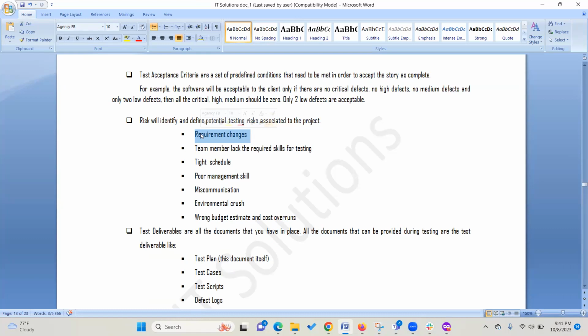They can go and change it. It doesn't impact you. But at a later point, when you prioritize this task and everybody started working on it, some development has been done, and now they come back and change it, that's a risk. So they need to know when to change the requirement. And if you're changing the requirement at a later stage, that's a risk because you already spent so much time on it. So that's something you need to highlight, basically.